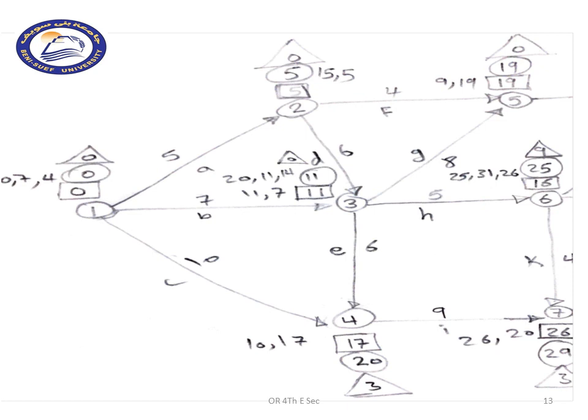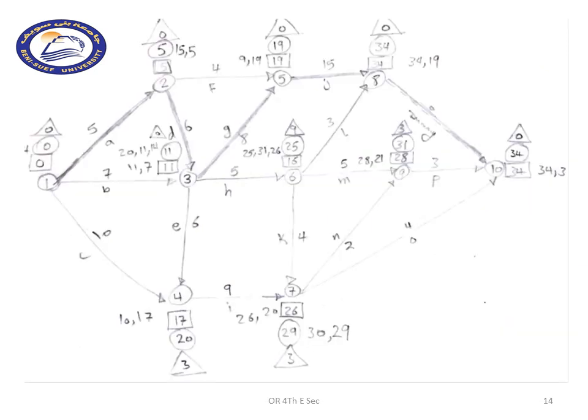And when you reach the end of the network, you take the duration that is written on the rectangle, you reflect it in the circle, and you start deducting like we did now. So here this is the PERT network with all the information that we need: when to start an activity, when to have some flexibility in making a late start in some activities, which activities are critical.